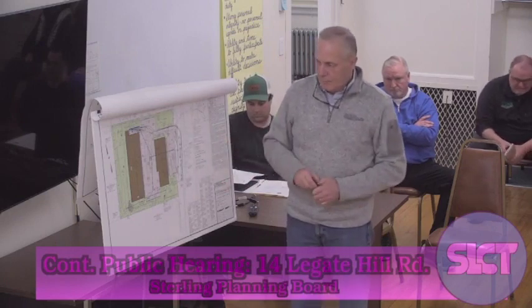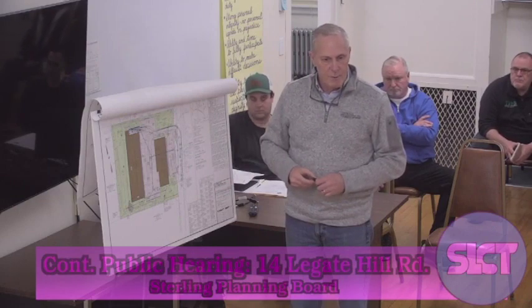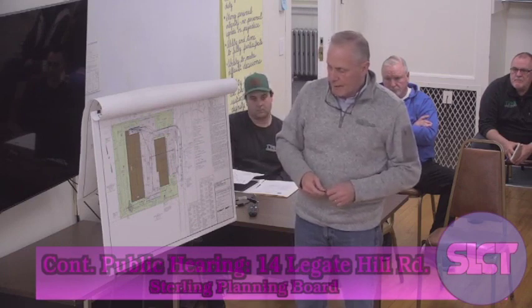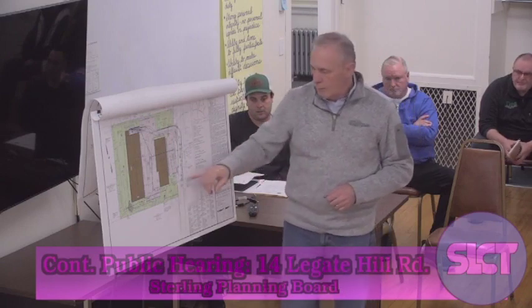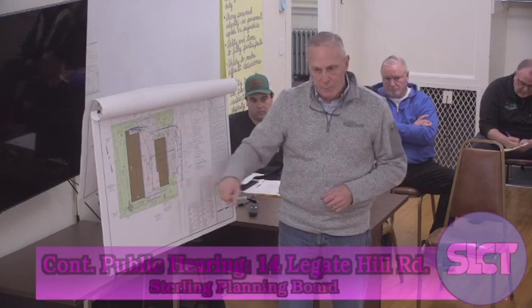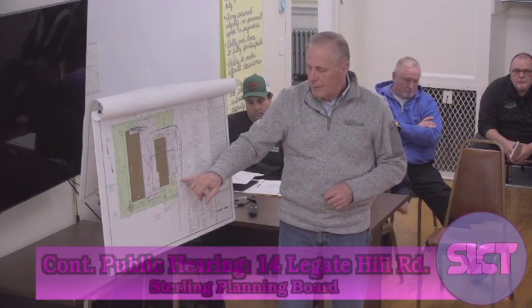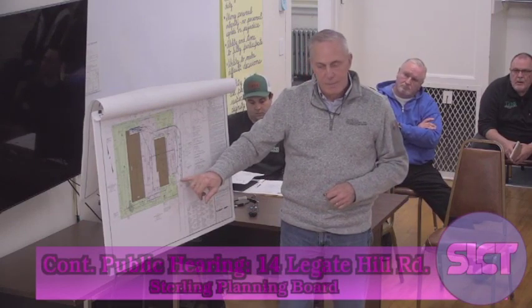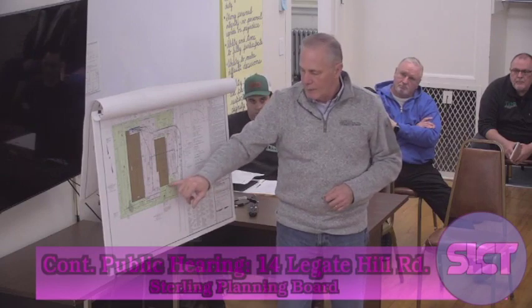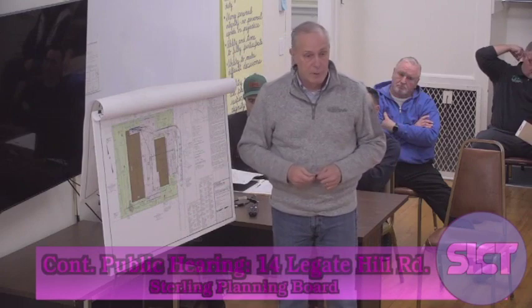And that's, I think, a good accomplishment, and we're happy to request the withdrawal of the request for the special permit. Now we're back to a simple site plan, and the only other things that would need to be added to the plan from the last go-around were the addition of the water main that was found by the water department, who sent us some information on that, and notes saying that we're going to cut and cap the service at the street, remove that, and reconnect it back on the new line that's coming into the building. So we're showing that information with the appropriate notes. I believe that's really it on the plans.